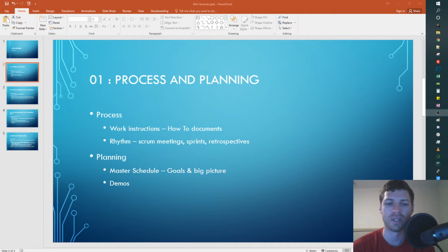And I found that when we didn't have a very good schedule, there were teams working in their own silos and not really working together as a big project and putting things together. So one thing that I found is that even with a master schedule, you can still execute poorly. And I found that having demos, whether it's quarterly, or I think once a sprint might be a little bit too short of a cycle, really depends on the environment.